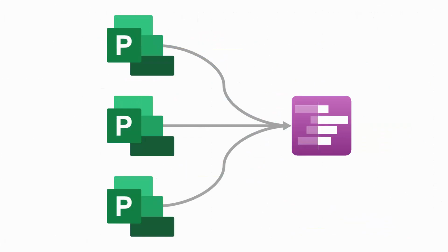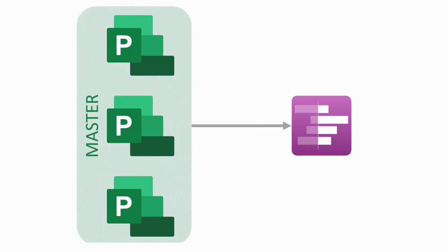You can set one up by creating a one-pager chart that points to different individual project plans, whether those are local MPP files or plans stored in Project Online or Project Server. If you happen to already have a master project plan or IMS put together that links several individual project plans, OnePager can import that instead, and all of your sub-projects will automatically be included in your chart.